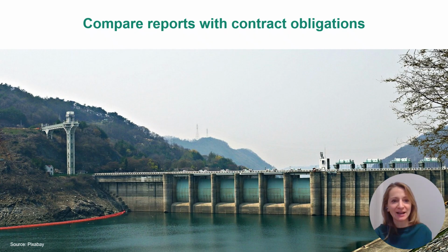Remember, compare reports with contract obligations. Make sure the supervisor's reports match the requirements in the contract. If the reports show something different from what the contract demands, it may signal irregularities.